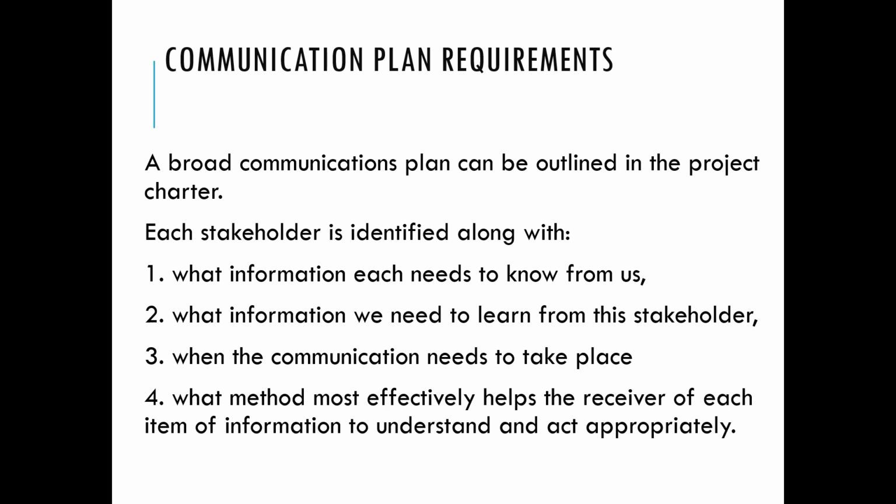A broad communication plan needs to be outlined in the project charter. Each stakeholder should be identified along with what information each needs to know from us and what information we need to learn from each stakeholder. When should a communication take place and by what method? What method is most effective or efficient, that helps the receiver of each item, or each stakeholder, to understand and act